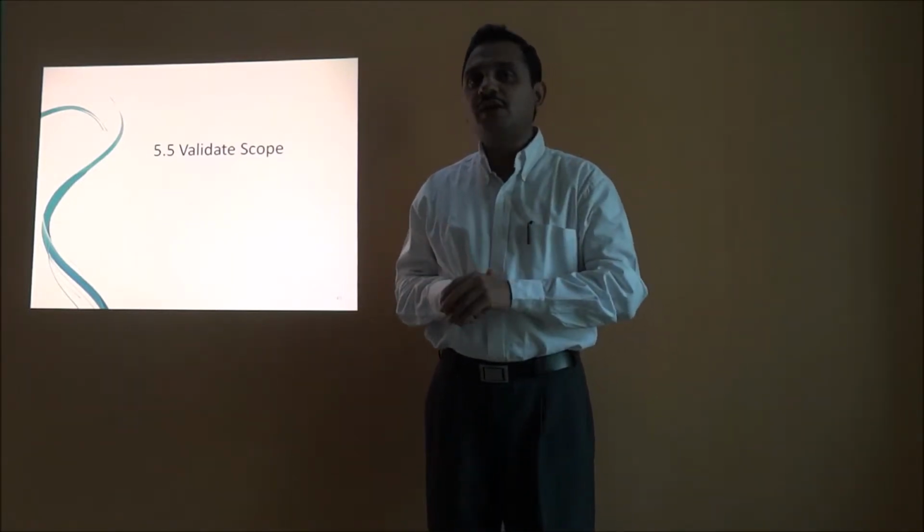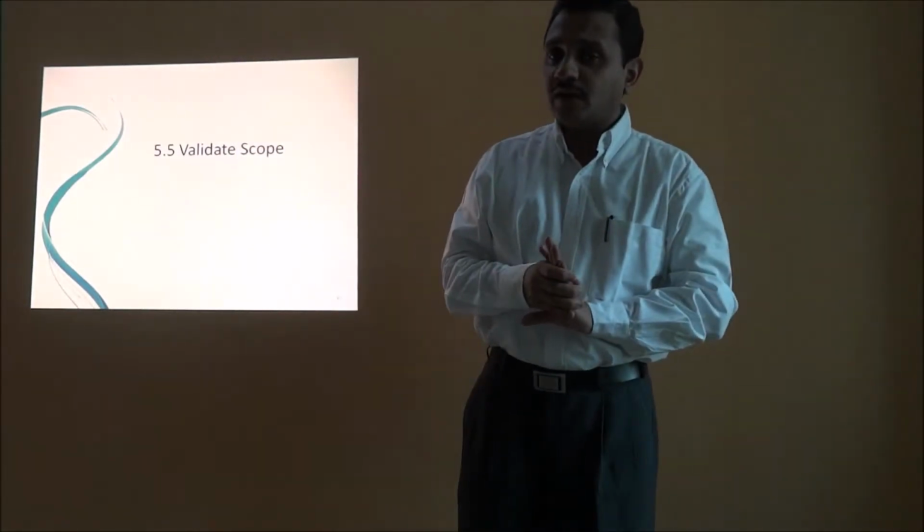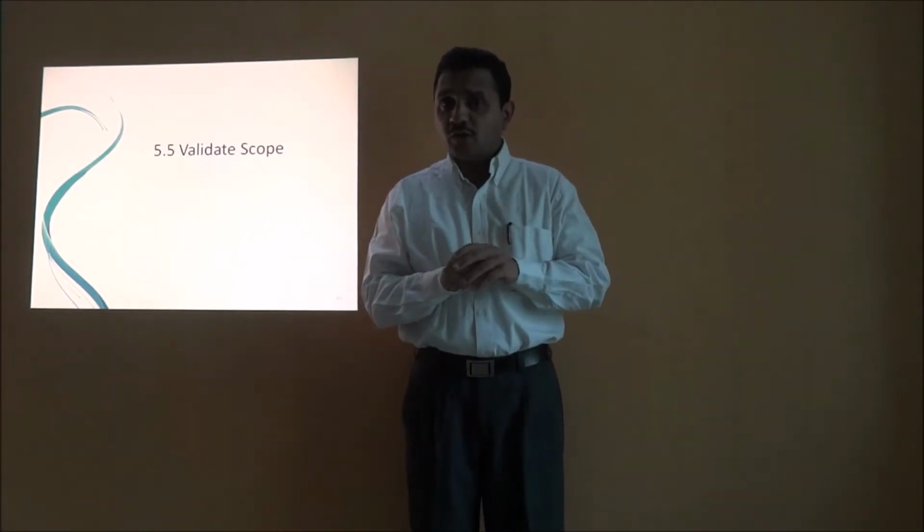Builder now calls their department which inspects the quality of the flat before calling the customer for taking the approval or handing over the keys to the customer. So the builder calls their quality control department and asks them, can you inspect the flat and ensure that everything is perfect? Quality control department comes in the flat. It might be a couple of people from their own team who does an independent quality check on the flat.